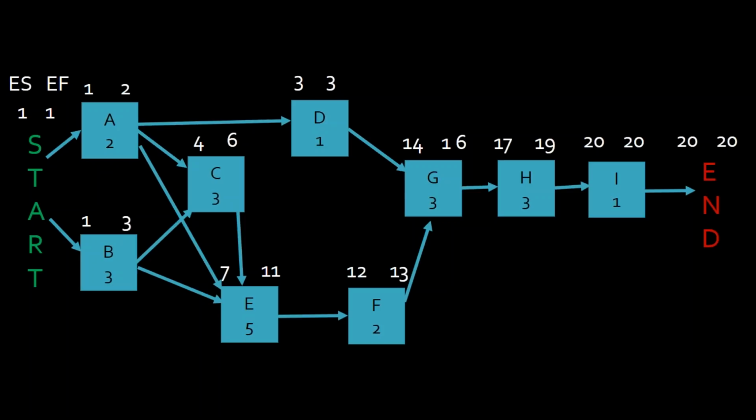You're not worried about the predecessor activity. H is standalone, just like every one of these. I even showed the counting for all 9 of these as I did them. H is a 3-day task. It starts on day 17 and ends at the end of business day 19. That's 3 full work days in the real world. Okay. You don't sound like you're convinced.